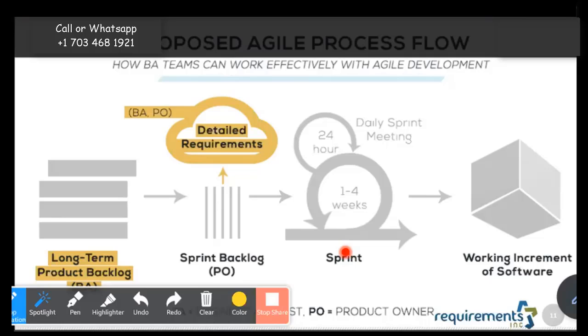Remember in our example, waterfall, we thought about doing the entire project in a year. And then in the iterative model, we said, okay, 3 months, we'll do that cycle and then we'll repeat that 4 times, right? So it further reduces one cycle; in that reference it is 3 months. Now instead of the 3 months, you're repeating that cycle every 2 weeks. So imagine in a year, you're going to have 26 sprints.